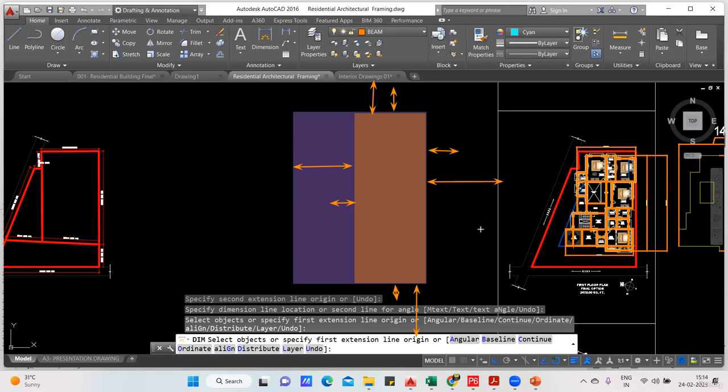But the normal construction practice is 1 meter from all the four sides. If you don't have space, no problem. Wherever you have space, there you utilize it. But when it comes to the building, you're supposed to take 1 meter, 1 meter, 1 meter, and for that only they are going to pay you. Okay, this much is understood.